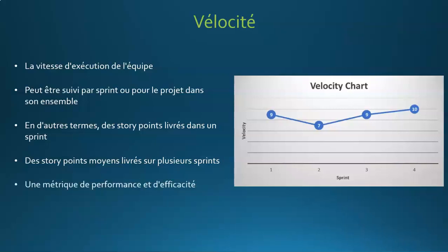Why measure it? Because it helps us in the planning process, but also because it helps us track performance and efficiency. For example, if we should deliver a certain number of story points in a sprint and imagine that we only managed to deliver 8, then we should reflect on that in the retrospective and see where we went wrong. Did we try to do too much? Did we run out of time? Did we encounter obstacles that we were not able to solve in time? There are many questions that allow us to improve.